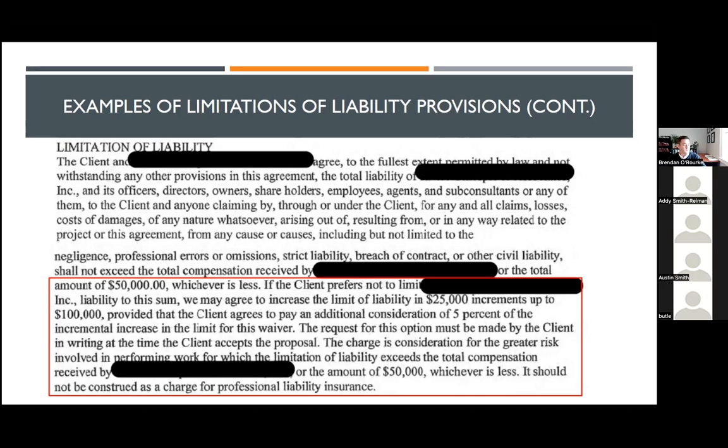If the contract has something like this, I like to say, well, we gave the client every option to, if it wasn't satisfied that was enough, negotiate with us and provide a small fee, essentially, to buy more protection. Giving the owner the option, I think, is a helpful way to later down the line make that limitation of liability provision more impactful or enforceable.